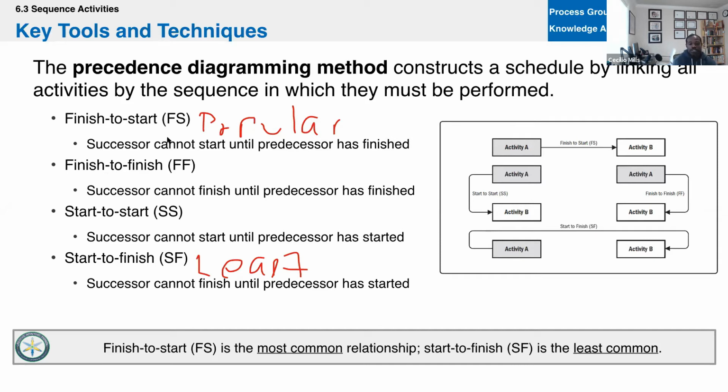Right, you have start to start. This is like as soon as the author of a book begins writing a chapter, an editor can begin editing. Right, he doesn't have to finish the entire book. That's your start to start.